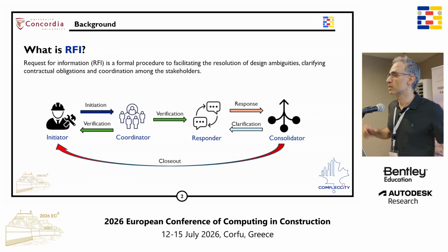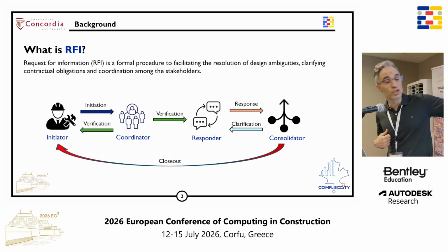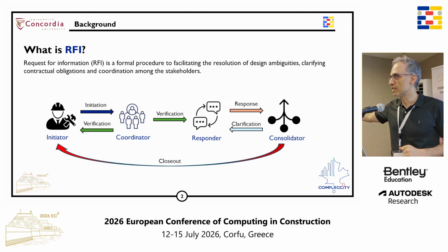Very simple process on the face of it. There's an issue, there's a question, the initiator initiates that, sends it to the consultant or the design team, somebody coordinates that, gets the response, and once it's done, basically it's closed out. Very simple and easy process.